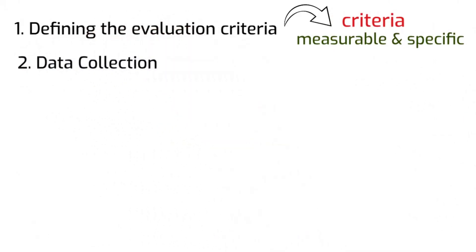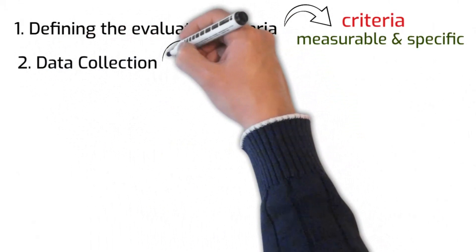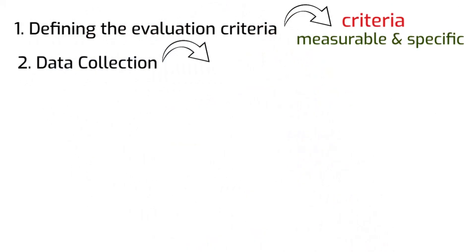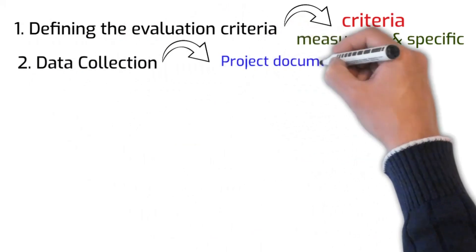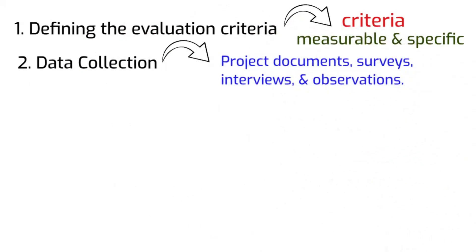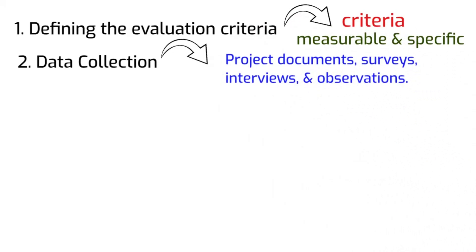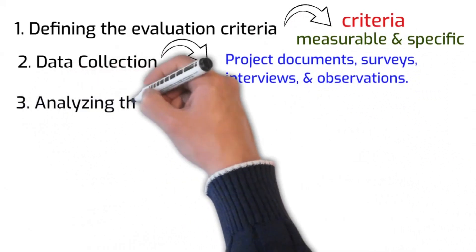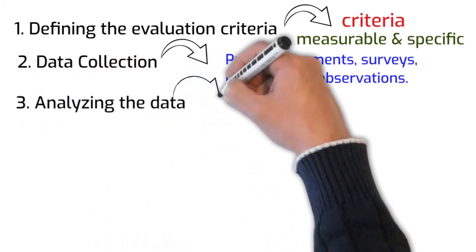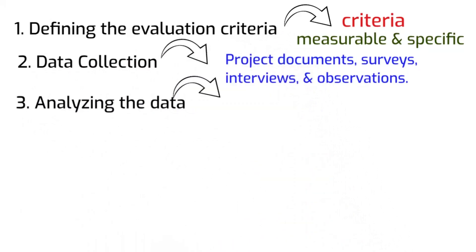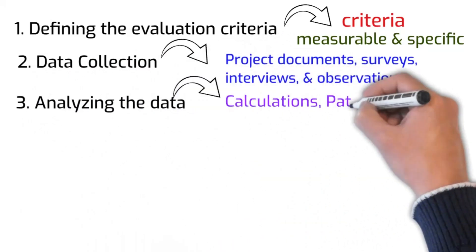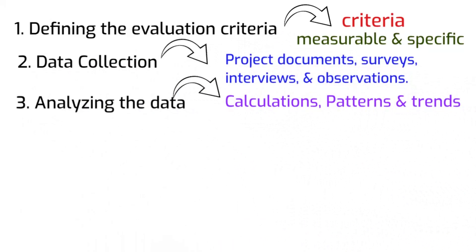Number two is data collection. After defining the evaluation criteria, we can start collecting data to see the project's performance against those criteria. Data can be collected through project documents, surveys, interviews and observations. Number three is analyzing the data. Once the data is collected, we need to analyze it to identify patterns and trends, and look for areas where the project has met or exceeded expectations and areas where it has fallen short.